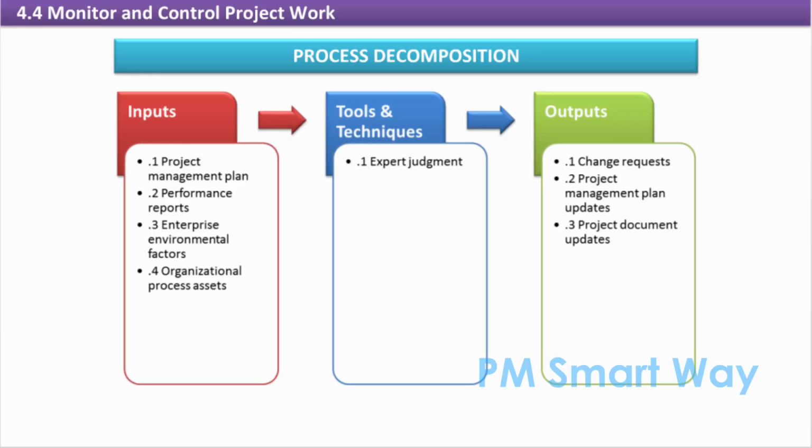But variances do not always mean that the performance level needs to be changed. In some cases the variances are acceptable or unavoidable, and so what will be pursued will be a change to the plan to accommodate the variance.